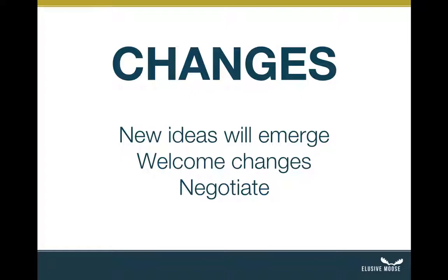We can reduce the functionality somewhere else and save money. So in the third case, I might swap out features. Say, well, if this new idea is really that important to you, and I'm estimating it's going to take me maybe half a day to do it, let's see if there's anything in the feature list that we could wait on. It'll keep us on track with our budget, but we can negotiate.